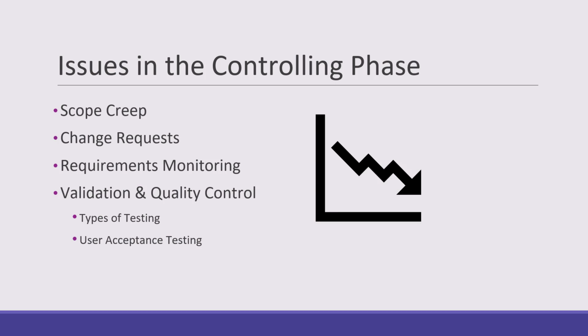As work is beginning to be planned, new ideas from stakeholders or the oversight team or the project team often arise. Some of these ideas are certainly valid and should be included in the project through a process called a change request. Many times, too many of these ideas are incorporated despite not being directly additive to the project goal. The project then becomes bloated and unfeasible and often fails.